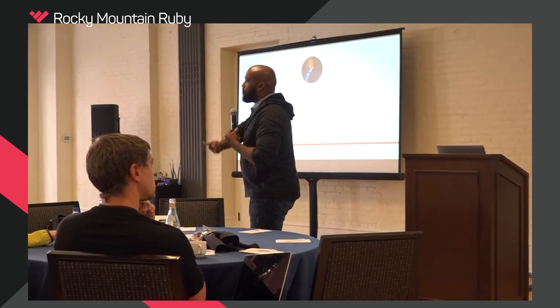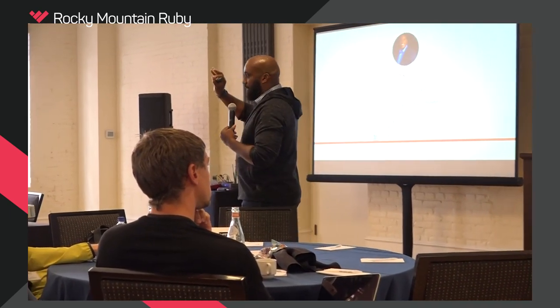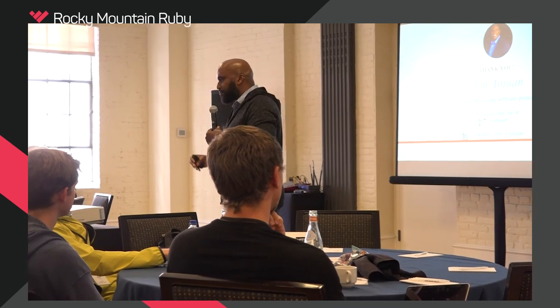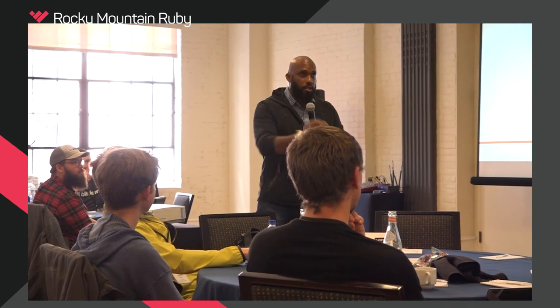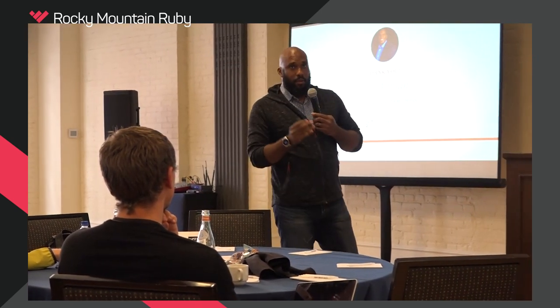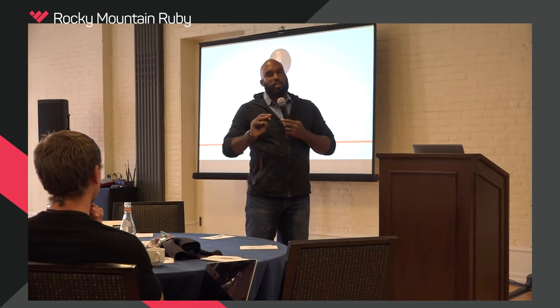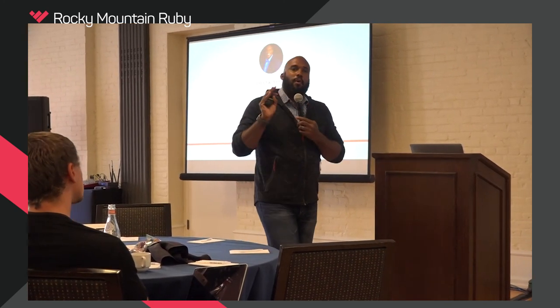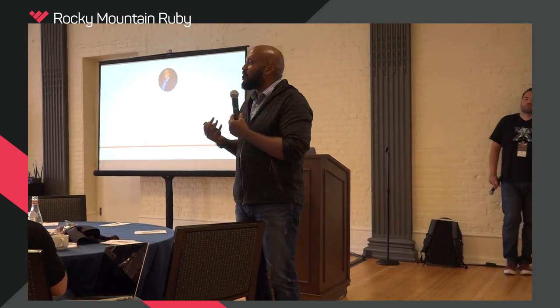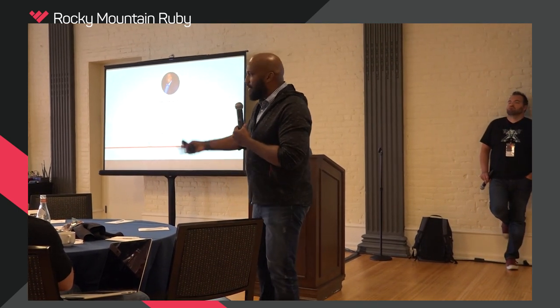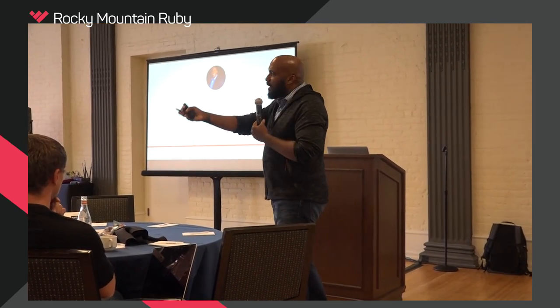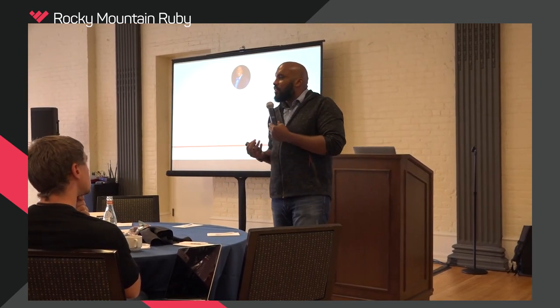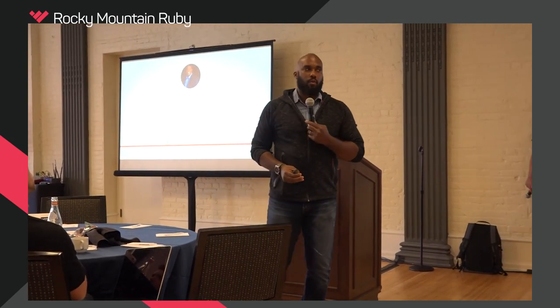In general, this is a broad rule of thumb. I usually find that Scrum is really good for new development, right? We're on the Enterprise going to a new planet. We're building something totally new. It's usually not totally new, but you think it is. But if we're building something totally new, then I think Scrum is great. Kanban, I think, is usually more for maintenance. If you have a product that's been in production and you're doing either break fixes or small features, in general, I like Kanban for that type of work.